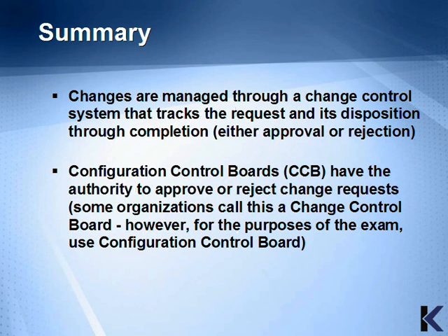Changes are managed through a change control system that tracks the request and its disposition through completion, either approval or rejection. Configuration Control Boards, or CCBs, have the authority to approve or reject change requests. Some organizations call this a change control board. However, for the purposes of the exam, you should use Configuration Control Board.